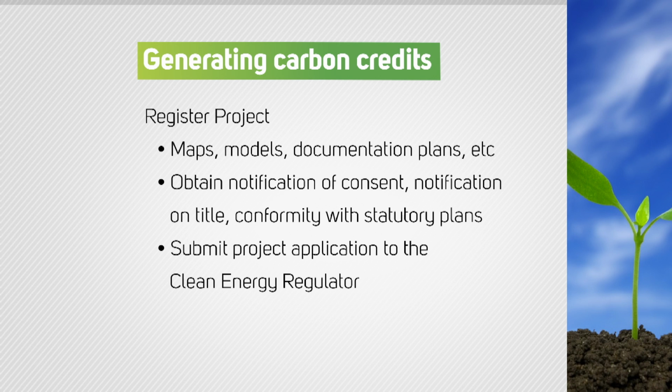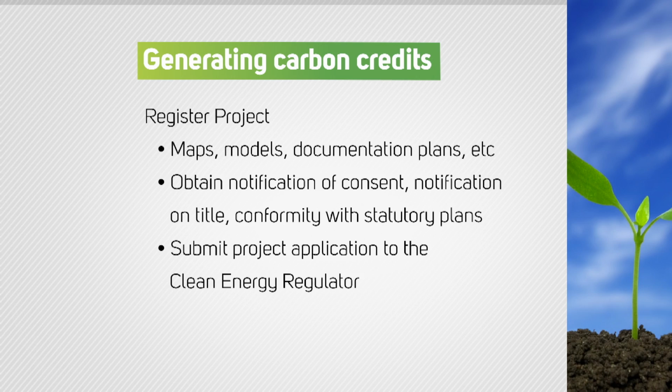Also, if you're doing sequestration, you have to obtain your notification of consent. If you're leasing, the property owner has to confirm it. Your notification is put on title and you conform with all the statutory plans. Once you've done all that process, you submit it to the scheme administrator and they'll assess it. They'll have a look at it and say, well, is it in the eligibility criteria? And the checklist goes, maybe a page, 2 pages of tick, tick, tick.